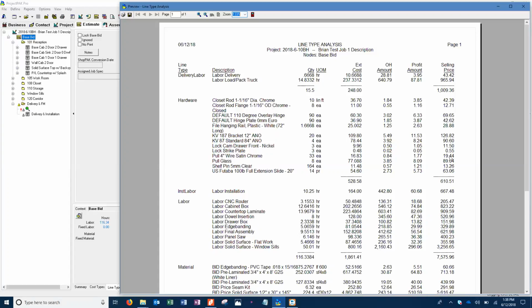Well, now I would make a copy of the entire quote, and I would make a job spec, and I would change those 5 attributes. So they can see that the price of this way is this cost, and the price of that way is this cost. And then they can tell us which one they want, and then that's the one we release. Well, for shop pack further down the road, if I do it that way, how are they going to see which pull I used and keep track of the change order? It sounds like you're just saying that's just a number. It is a number, but you would actually pull in the proper pull. Well, I guess that's what I'm getting at.